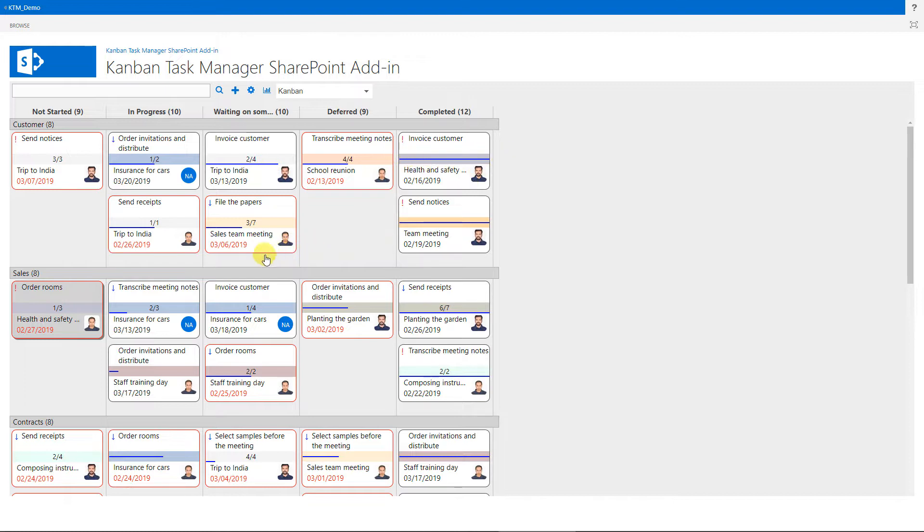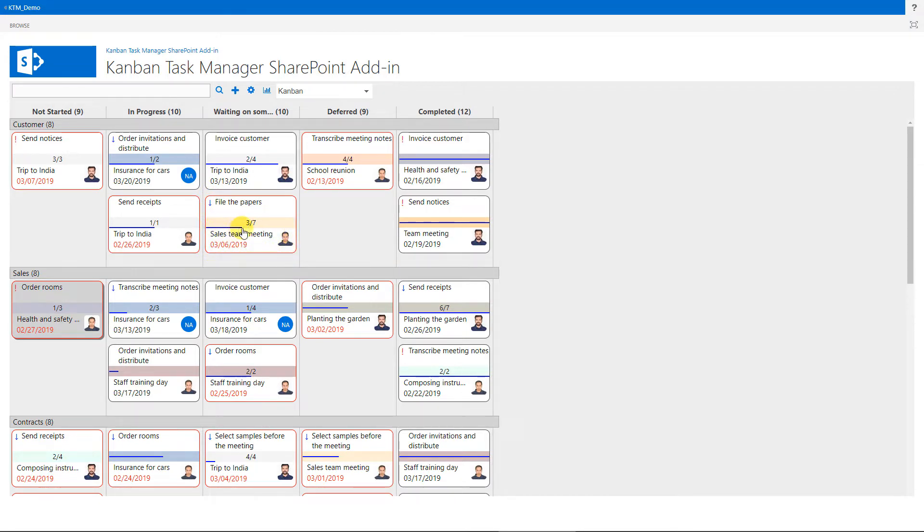This red border on the card is a warning that the task has passed its due date. And this line shows how much of the task has been completed. This is the checklist count, which is also a way to show how the task proceeds.